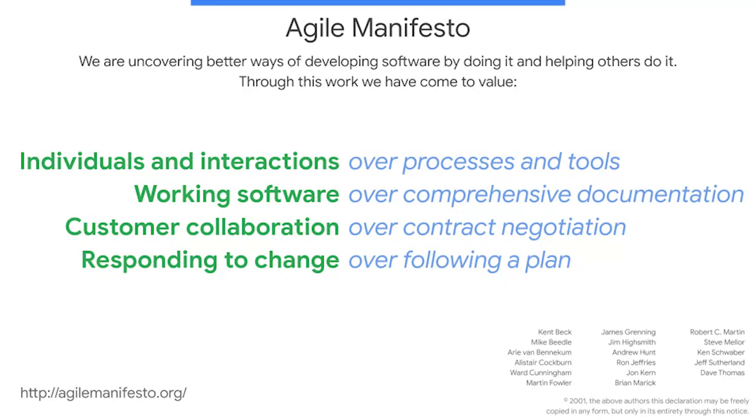Since Agile is all about embracing and anticipating change, it might seem like having a release plan goes against the Agile value of responding to change over following a plan. But having a release plan does not mean you are resistant to change. An Agile team treats a release plan as a living artifact, so the plan can change based on the environment and new information that's received.